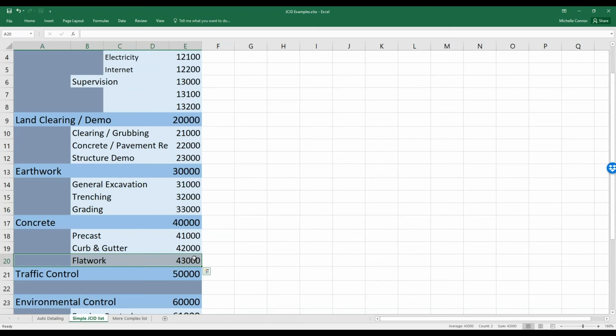So having to flush a pipe, inspect a pipe, and then line a pipe is a different process than putting different sizes of pipe in the ground. And that's a place where it might make sense to add a code, as opposed to just having a code for every single incremented size of pipe. Or one that I see more often that tends to work better for companies is they'll do categories. Hey, it doesn't make too much difference up to 12 inches. And then anything between 1 foot and 3 feet in pipe width is close enough that we're going to get the information that we need. And then anything that's wider than 3 feet is when we really want to see it as an individual item.